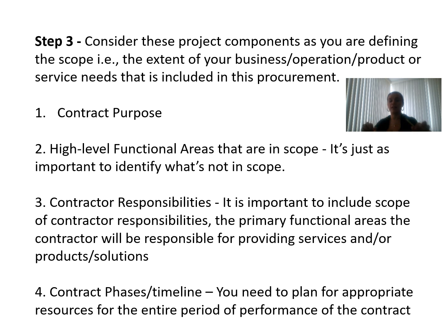Most of the projects that need a special procurement as part of their activities, when the project owners or project managers do not take enough time in this step, at the end they need to go through a whole contract change process, because most of the things are not clearly defined at the beginning. So take the time. Maybe it could be boring, but it's necessary, for time and money.